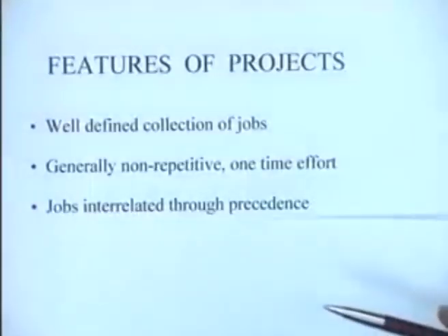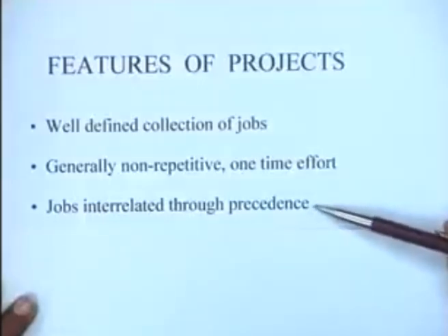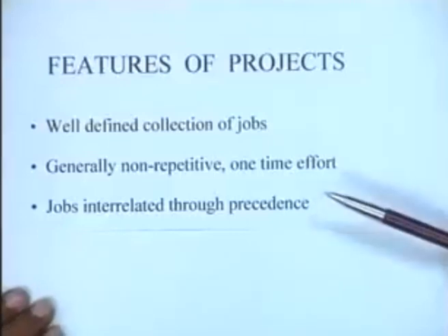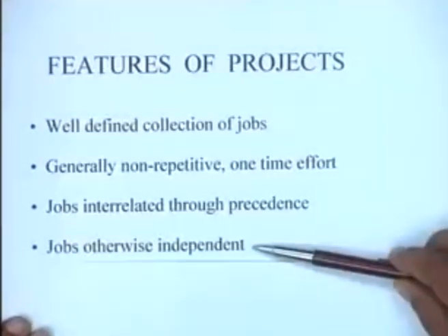These jobs which we are talking about are essentially interrelated through precedence. The notion of precedence is very common and generally well understood. For instance, you cannot do the brickwork for a house until the foundations have been completed. So doing the foundations becomes a predecessor for the subsequent brickwork. Similarly, in all projects, jobs are interrelated through precedence, and precedence is an important thing in planning project execution. Otherwise, the jobs are independent.